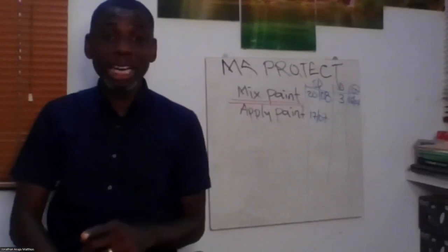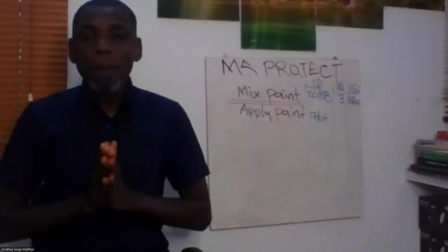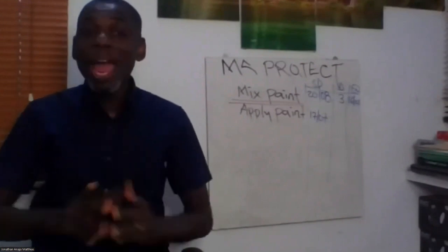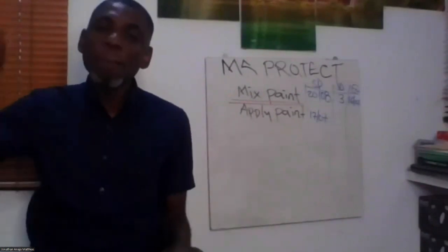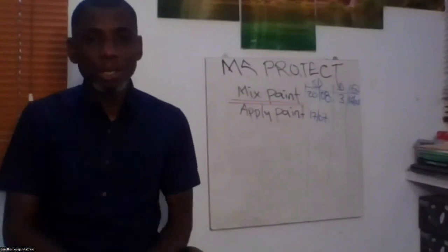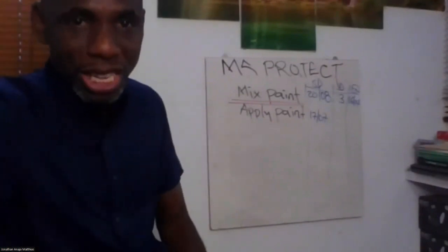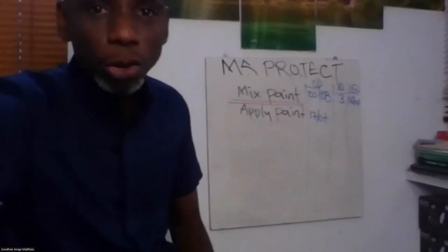So I want us to note that rule number 1: never schedule a project on MS Project and allow any activity to stand alone. It must be linked to a predecessor. We're going to do it practically, so you're going to see how to link to a predecessor.